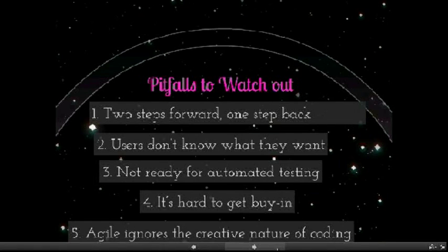Then again, the cost of adopting automated testing and the hassle in changing ways of working to accommodate it can seem more bother than they are worth. But failing to introduce automated testing makes it tricky for manual testing teams to keep on top of bugs during the short delivery times for each iteration of the software, particularly as the overall code grows in size.